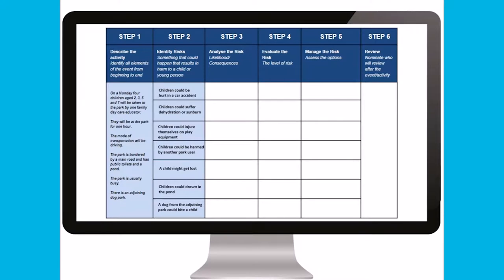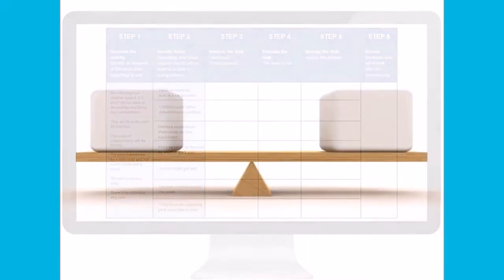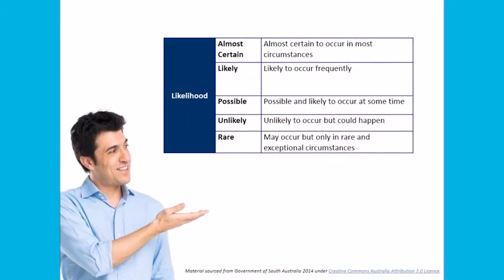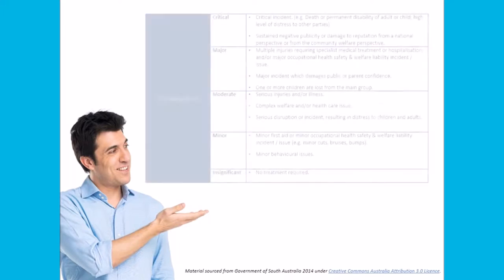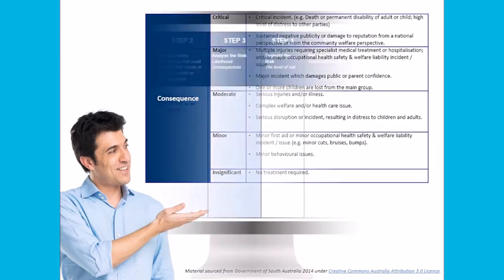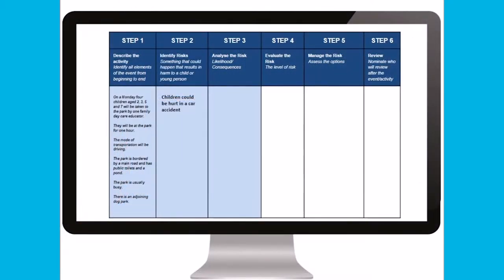Step three is to analyze the risks. In this step you should consider how likely it is that the risk will occur and what would happen if the risk did occur. The likelihood can be determined on a scale of rare to almost certain, and consequence can be measured on a scale of insignificant to critical. For example, analyzing the risk that children could be hurt in a car accident: the likelihood would be rare, however if it did happen the consequences would be moderate to critical.